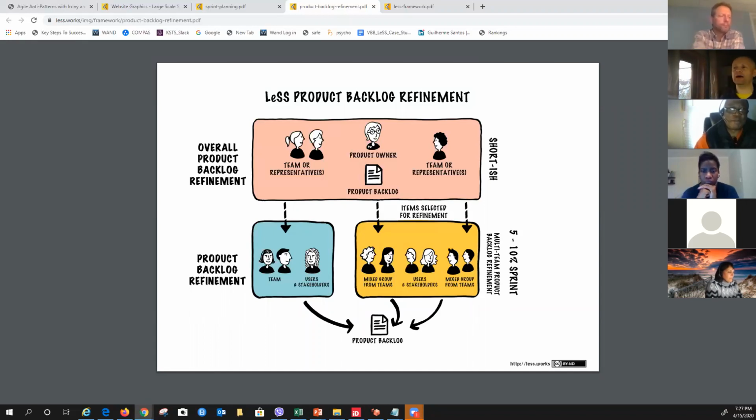We talk a lot. So when we do, there's also something called initial product backlog refinement. It usually takes at least 2 days, before we flip the switch to start sprinting for the very first time. It happens only once in the lifetime of a product group, because we need to give it a push, give it momentum. But then you just do it every sprint little by little.